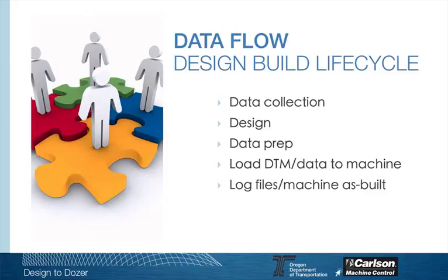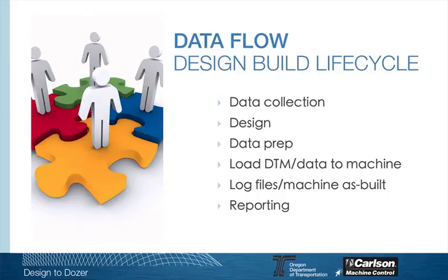Another capability some machines have is logging files for all their positions and activity. The systems are accurate enough to basically gather a real-time topo, updating the grid and the surface with each pass of each machine. At the end of the day, you should have an accurate topo or as-built of what the machine actually did that day. From this we can determine how productive the machines are, as well as generate different reports from this data.